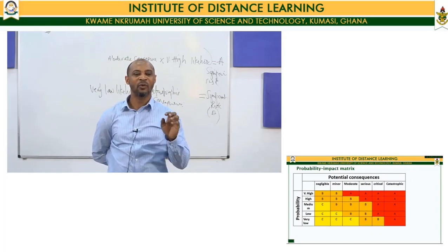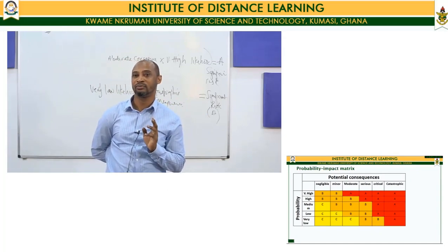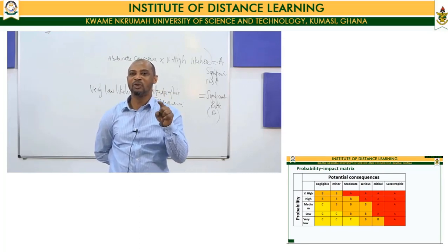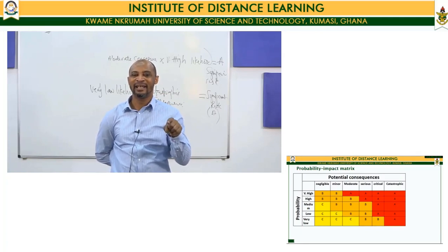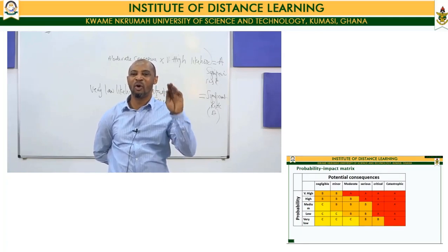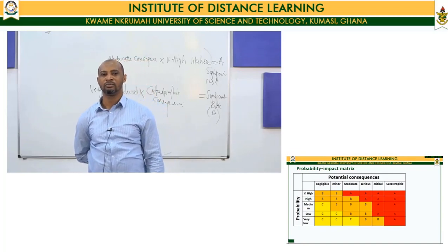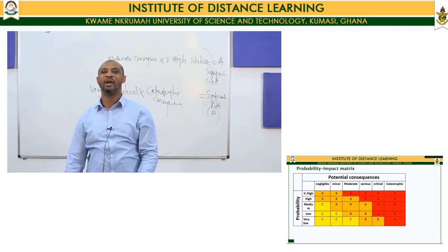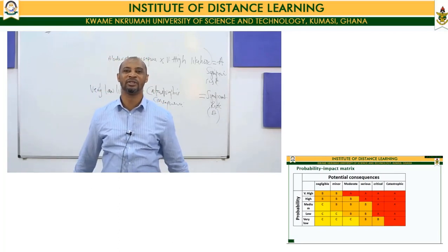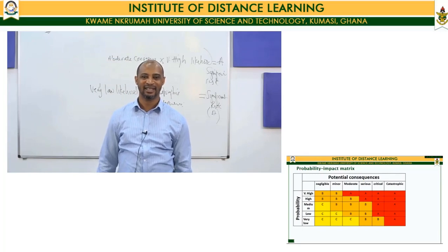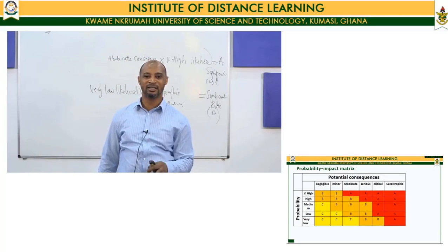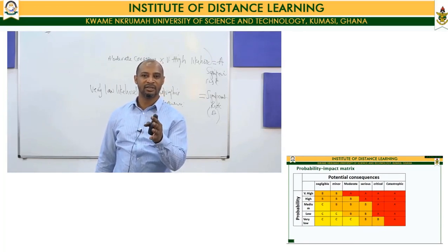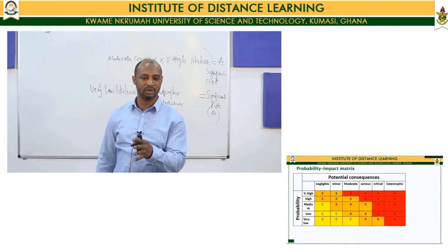So you see that if consequence is negligible and minor, so C, for it to be low risk, then the probability of occurrence must be medium or below. It is important to take note of this. So this diagram alone can comfortably give 20 questions. So do the careful analysis, but it tells you the levels at which we describe events as significant risk, medium risk, and low risk.